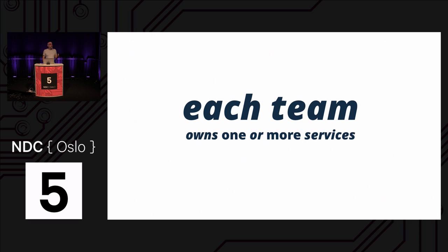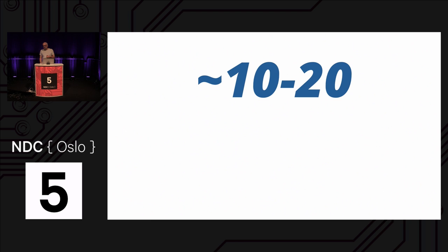And how big should these units be? Depends on the size of your company. If you're a 10-person startup, you'll probably have one team of 10 people, right? But if you're a retailer I'm working with at the moment, with many, many thousands of people, you need some way to subdivide yourself. And so this is probably familiar. This is sort of XP-sized. I would favor 10 to 12 rather than 20, but XP-sized teams, 10 to 12 people, cross-functional, organized in units of around 160 to 200.